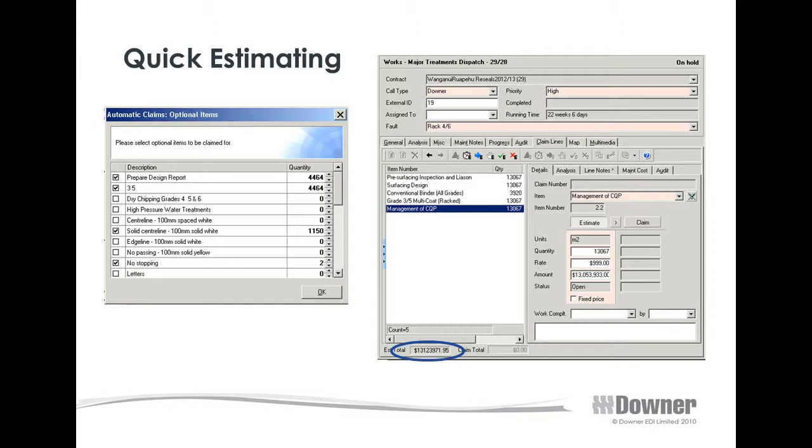We're using it to record things like preparation of the site, drawing up any surfacing diagrams, and on top of the sealing stuff, we can also record how much line marking's going on out there. I always had a plan that we'd be able to take this line marking information and correlate it back again to the asset management side of it, so we know how much line marking data we are putting down out there and change the renewal dates on that. At the end of this process, it leaves the client and us, the contractor, with an actual cost of what each site's going to be. So we can make sure the budgets are correct and we know where we stand.